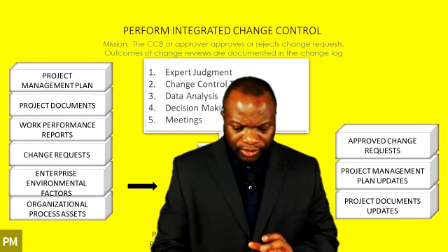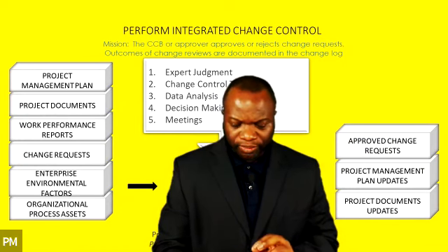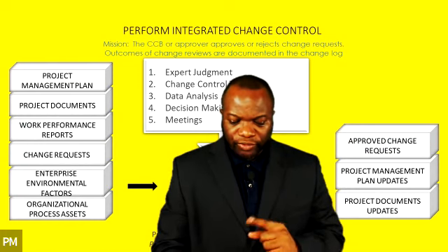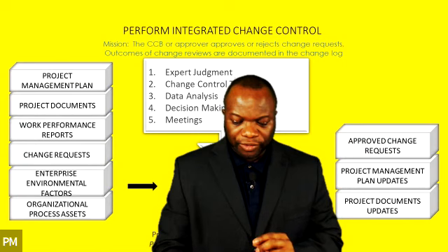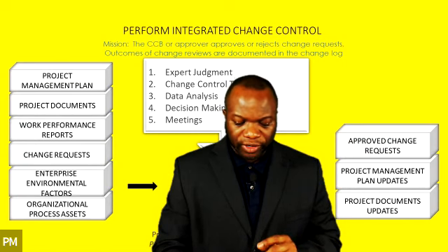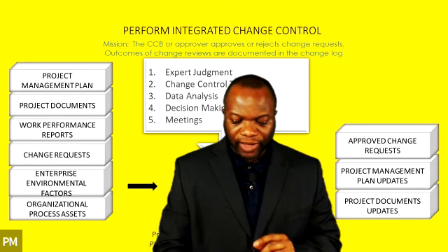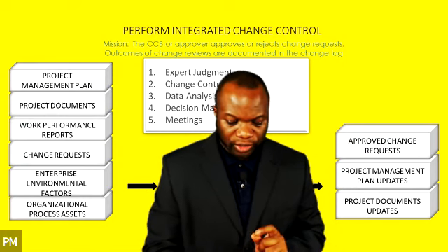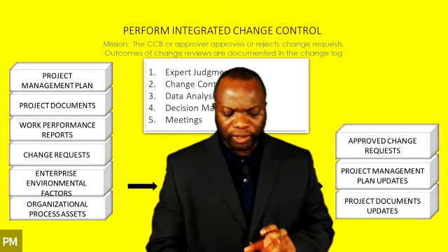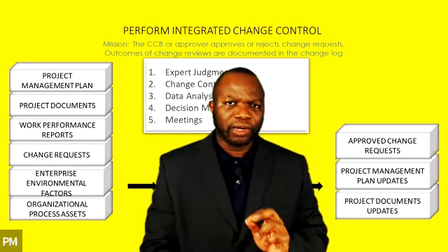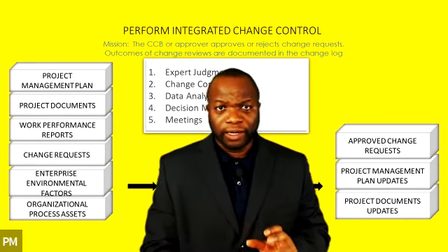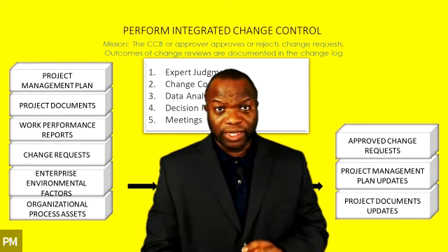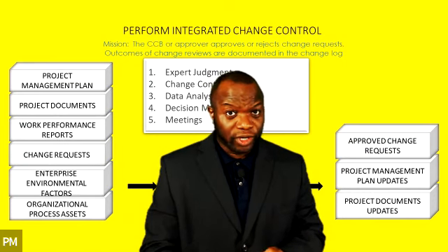And then it says, on the fourth line of the second paragraph, let's read from the third line. It says, as a general rule, each project's configuration management plan should define which project artifacts need to be placed under configuration control. What are they talking about? They're talking about the updates of any product features and functions, because these need to be documented and versioned.